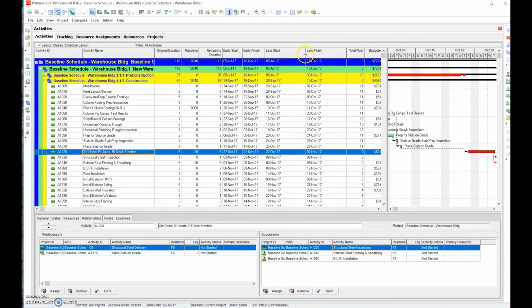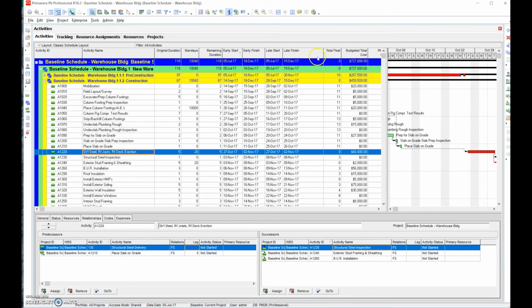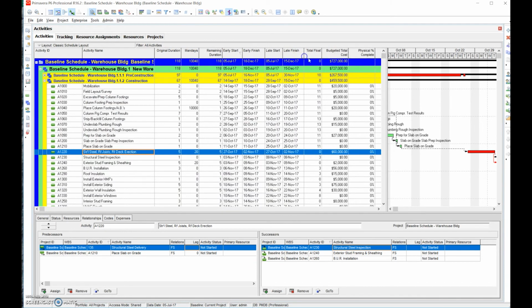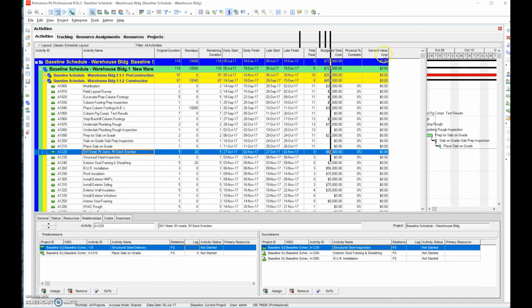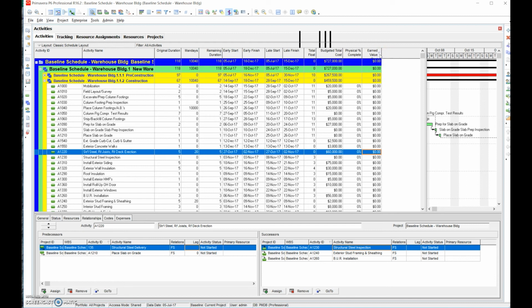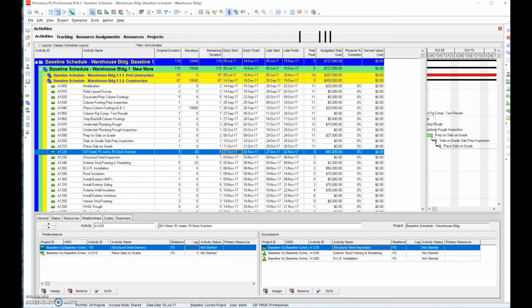After that, I also want to come in here and compress these a little bit. My big complaint is let's make use of the paper. We want to make sure that the schedule is one wide. We don't want it to be more than one wide because it makes it difficult to read when we do a printout. And I'm going to go over that in reports. So we want to minimize the columns as much as possible within a certain level of acceptability.